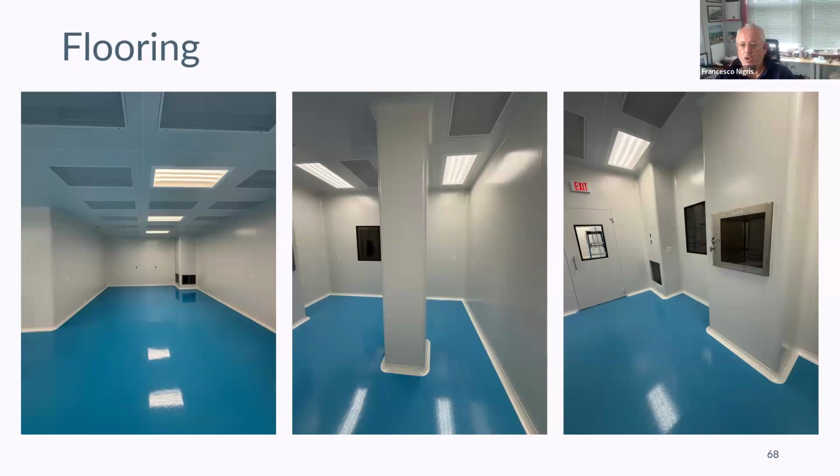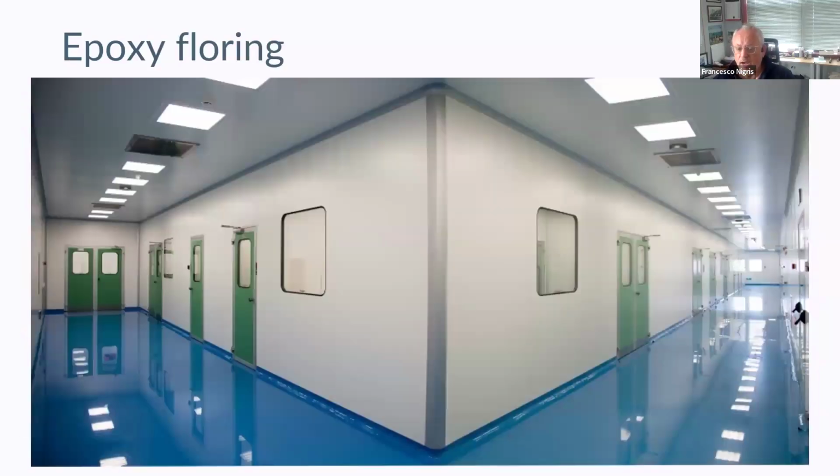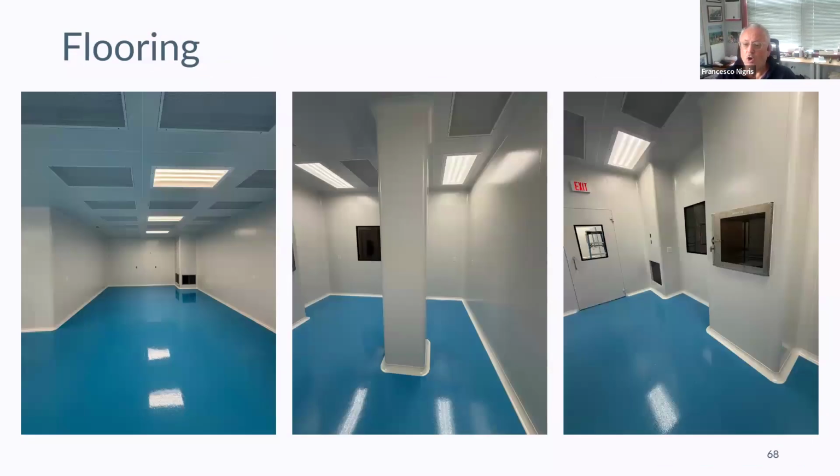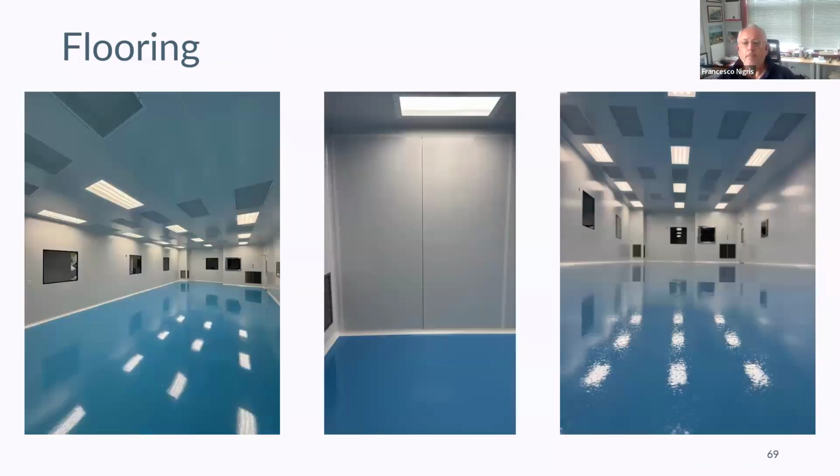And these are several options. And again, this is an option. You have the option, and that's something you may want to decide, whether the floor and the epoxy goes up to the wall, making a nice smooth connection, or you're going to put coving at the floor that is going to be placed after. So the good thing, in this case, is that you can do the floor before installing the walls.